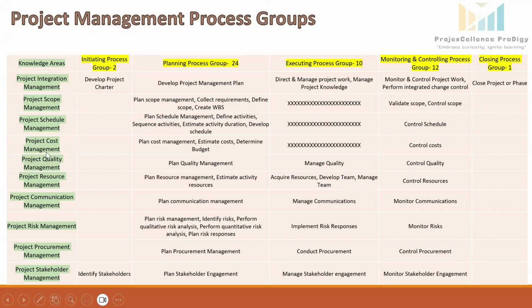Next, under the project cost management knowledge area, there is one activity: control cost. The control cost process involves monitoring and managing the project's budget to keep expenses in line with the plan. It includes tracking cost performance, analyzing any deviations, taking corrective actions, and updating the cost forecast. The goal is to ensure the project stays within its budget and addresses any financial issues effectively.